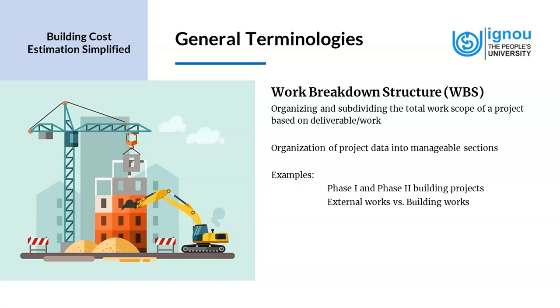Now, based on the work that is to be done, external works versus building works, that is again an organizing that we do, and this can be classified as work breakdown structure. So the important thing is that this has to be identified prior to taking quantity and estimate, because this is to be considered during the cost estimation stage itself, because this can have an implication on the cost.